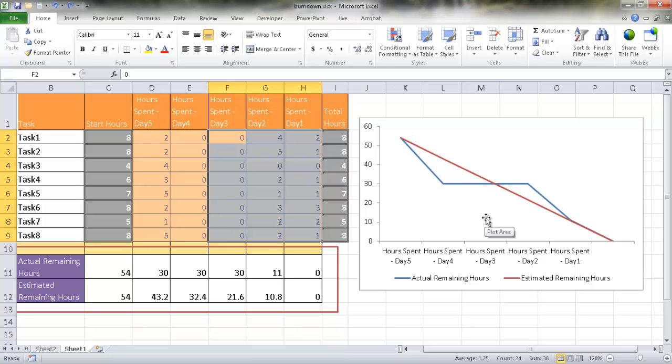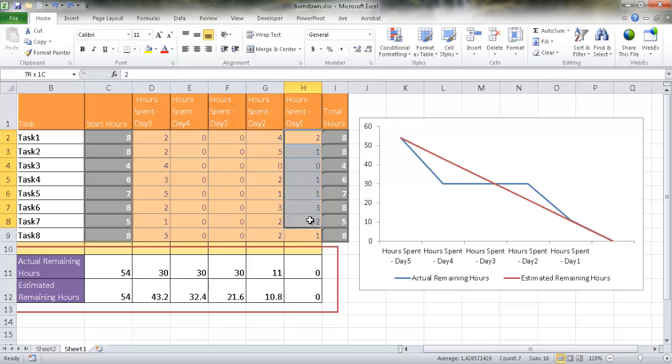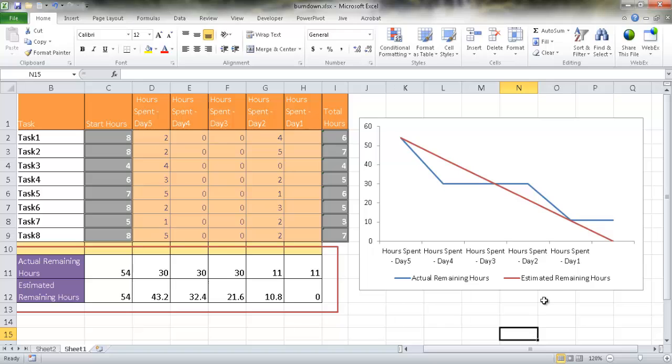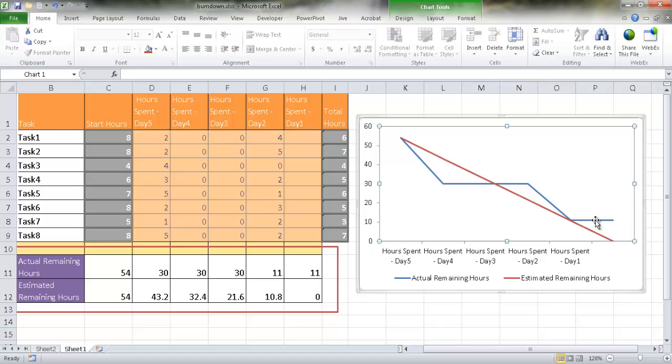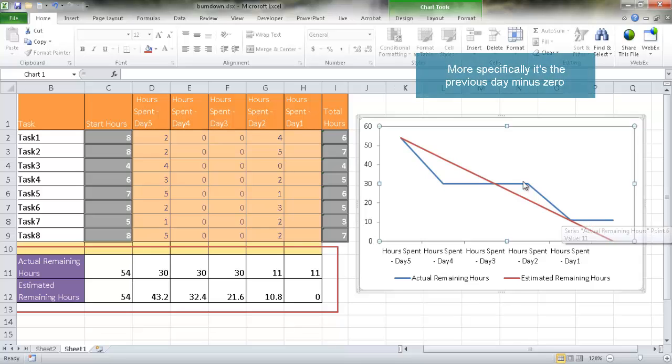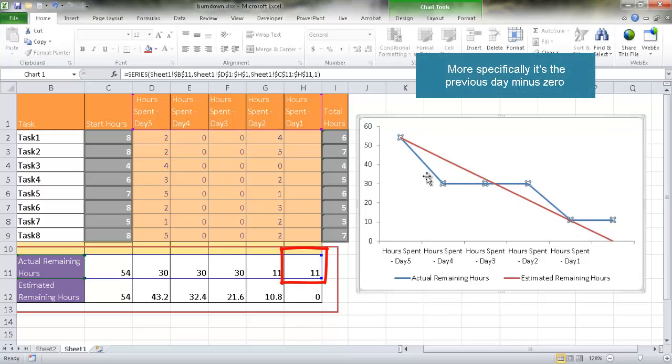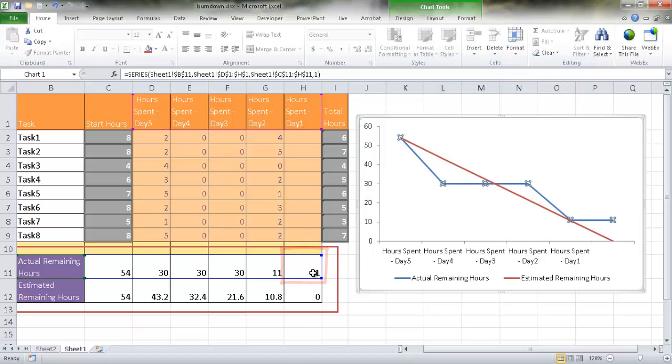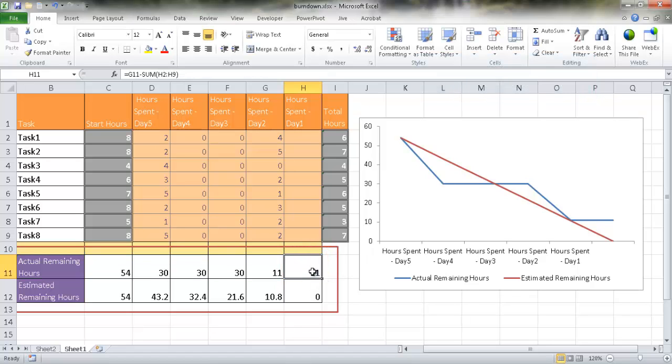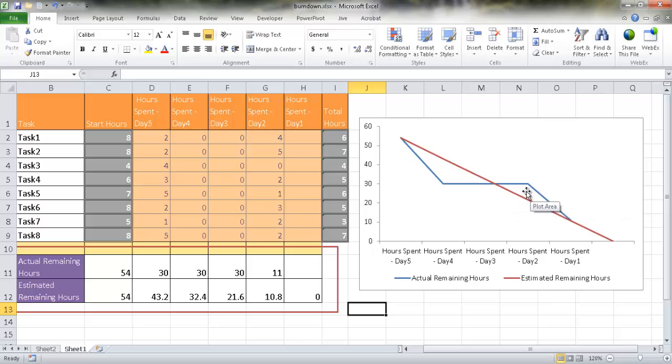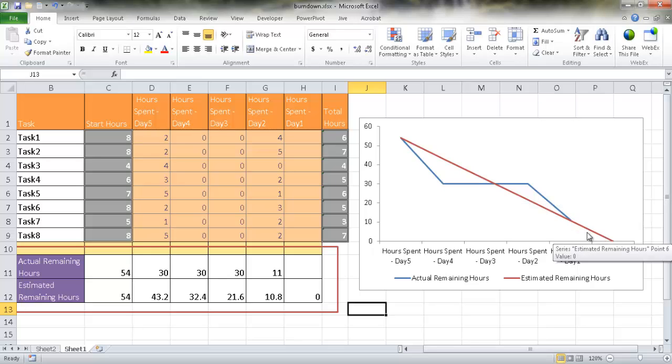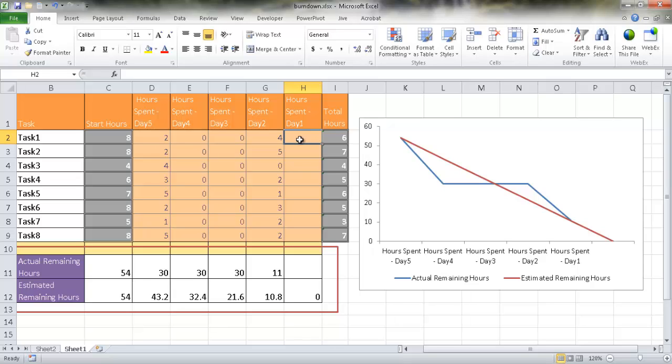And so now you'll notice that the burndown chart shows the example of where we're at. We can probably use this as a day-to-day project management tool. Let's say, for example, over here on day one, the last day, I'll go ahead and delete that. Let me copy that first, and then I'll delete it. And you'll notice that now it's kind of gone. That thing hasn't been charted here. The reason it's out here is because now it thinks it's zero. Let me select that line and delete that so it doesn't show up anymore. So that's gone. And if we were charting this on day two and we're looking at this particular gap between the estimated and the actual, we'll notice that now, hey, this looks like we are behind schedule.